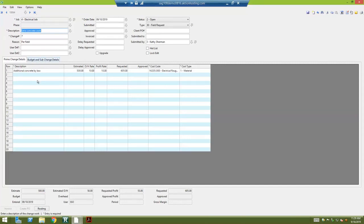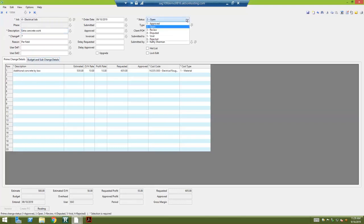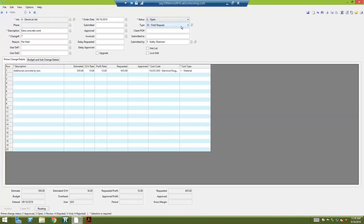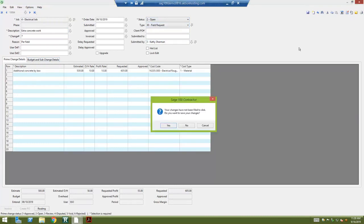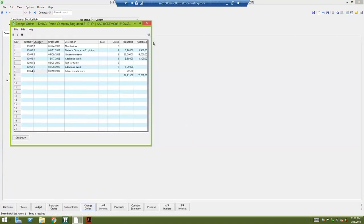The change orders once approved is when they'll come through to the job reports. Right now, mine is in status open. So we probably sent it off and are waiting for approval. Once it's approved, I would come in here and change the status to number one.